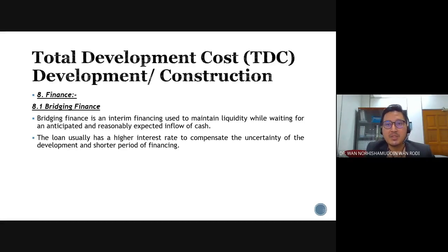Because during the construction, the developer will not get any income, will not get any return since the building has not been completed yet. So the finance or the money obtained from the bank can be used to finance all the costs involved within the construction period. That way the developer will ensure that the inflow of cash is not cut off. The inflow of cash is there within the project.